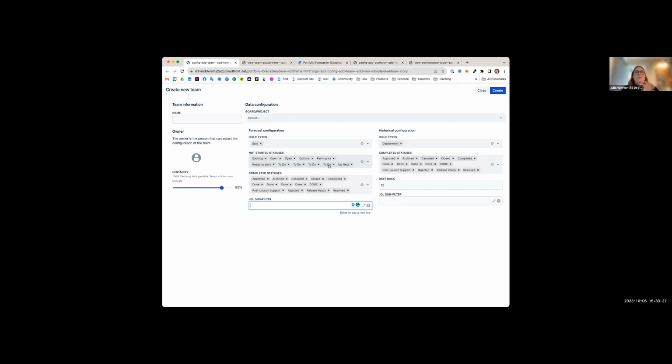Okay, so then you do this. Now we know what to forecast. We will always need the context, the rate at which you finish work. So the thing that we'll need to make sure that we guide people on here is, when you're choosing epics, you want to make sure that you're using the data for the kind of stuff you put inside epics, so that we can know the rate at which you finish those things.